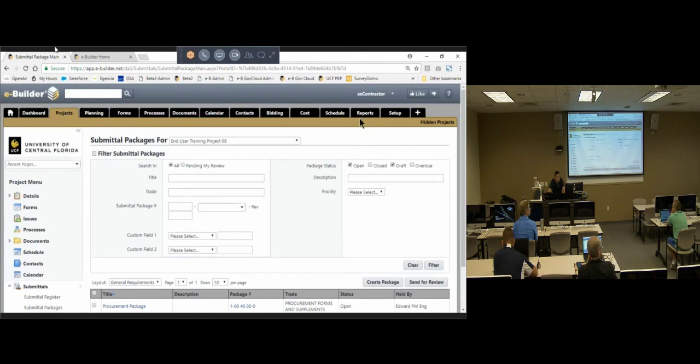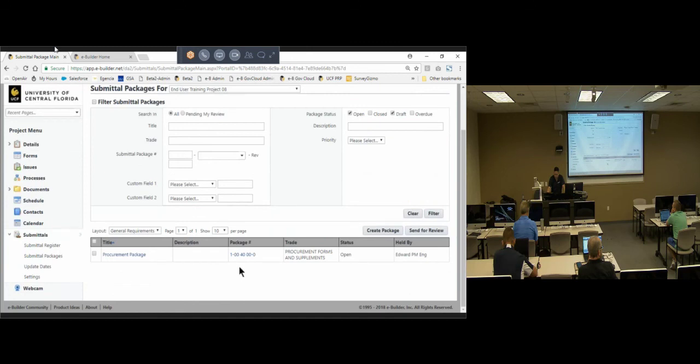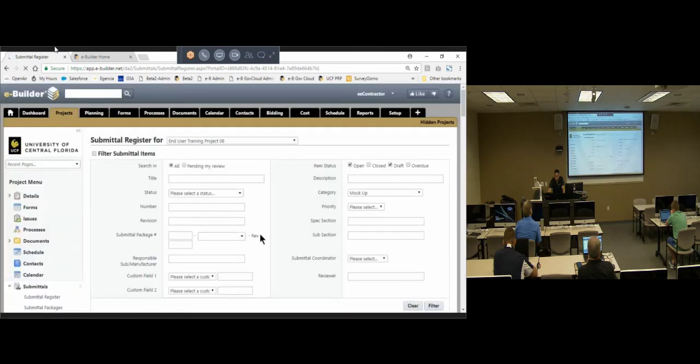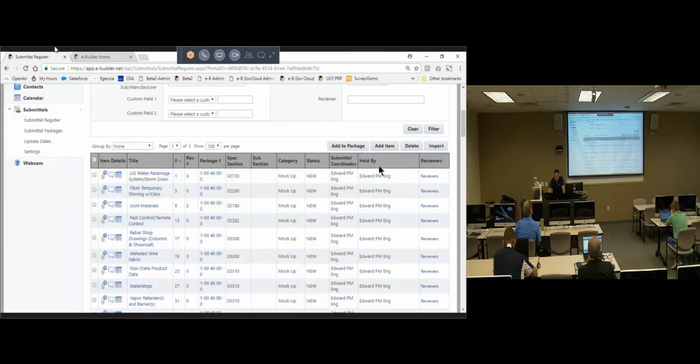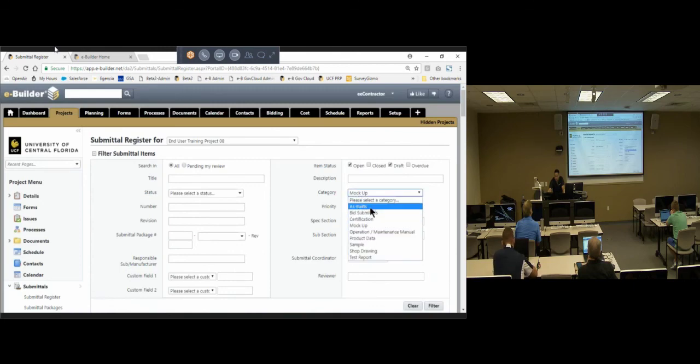Is the standard package numbering such that the first digit is the sequential number of how the packages got sent out, and the next series is always the number that you put in it, if you will? This one right here? Yeah. Because I know contractors and AE firms like to sort based on the CSI number, not necessarily the package for which they went out of UCF's. That's how we manage that to our sub-consultants, and I know all the contractors manage them that way as well, because they want to know which discipline they're getting their packages in and out of.